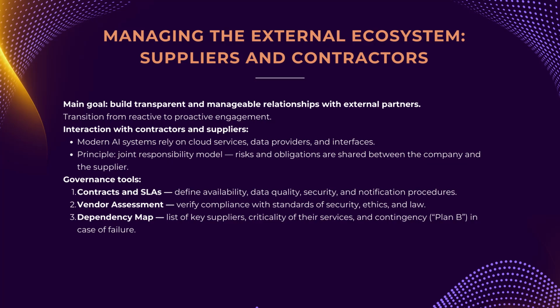Vendor assessments, evaluations against security, ethics, and legal requirements. A dependency map, an internal document listing key suppliers, the criticality of their services, and contingency plans.